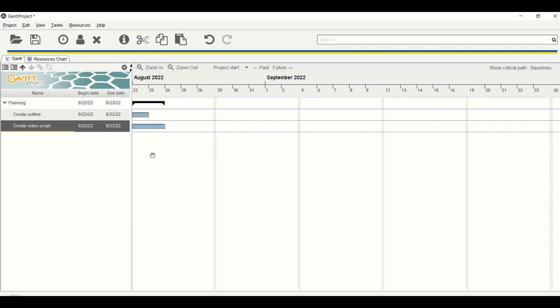Next, we need to add relationships to our tasks. The most common type of relationship is finish-to-start. That means only when Task A gets done can Task B start. For example, direct videos should begin after we have created the outline.